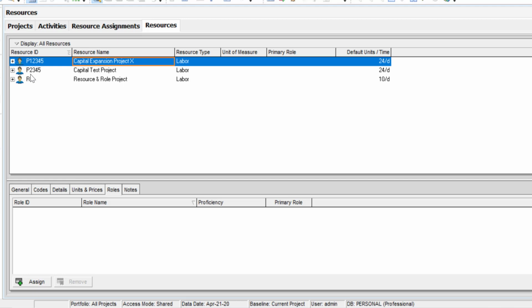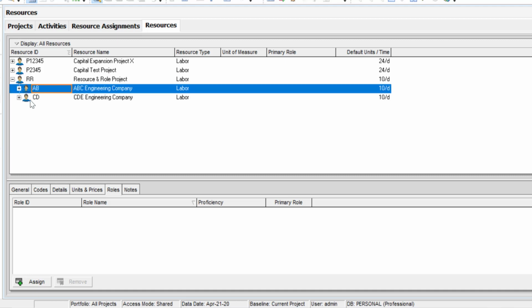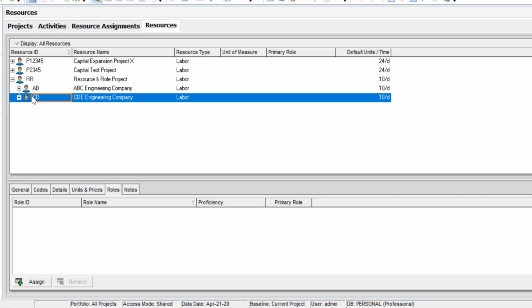We also go to the next level. So if I have a site located in one city, for example, we're located in Baytown, Texas, and we have another spot in Charlotte, North Carolina, I may set it up to the next level or level 2 to an actual site working location. Then under that particular location, we have a list of the projects that are being run at that location. What this does is give me as a scheduler the ability to build my resource pool under my location. Then I can build the companies that are actually going to come in and do the work.